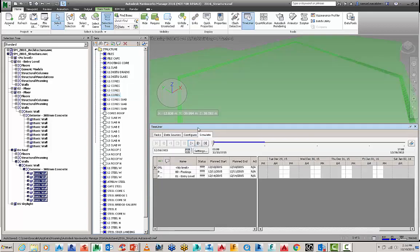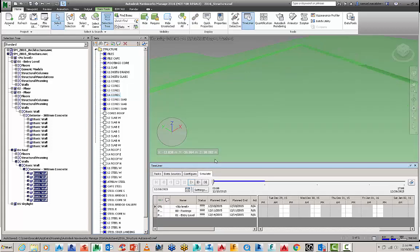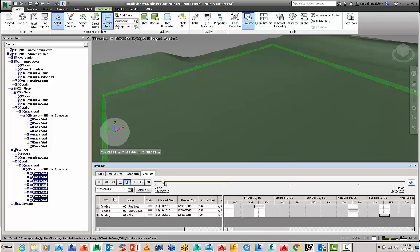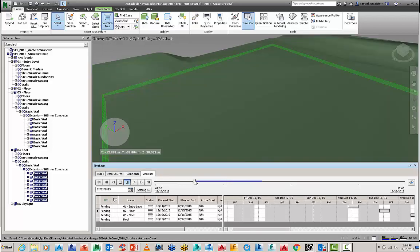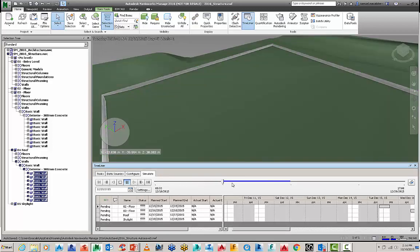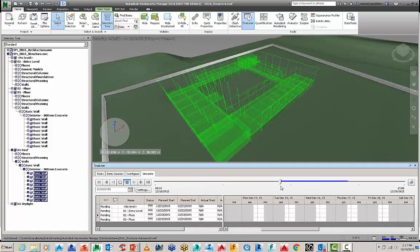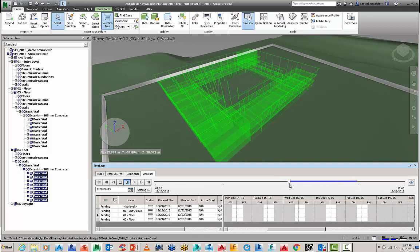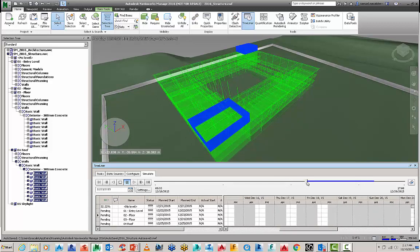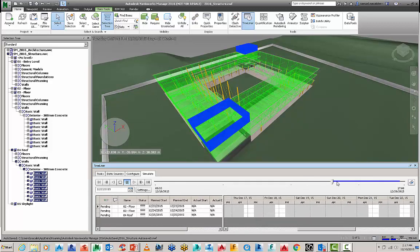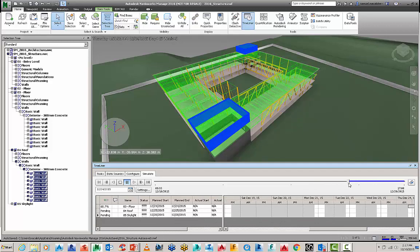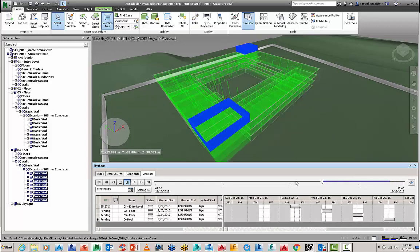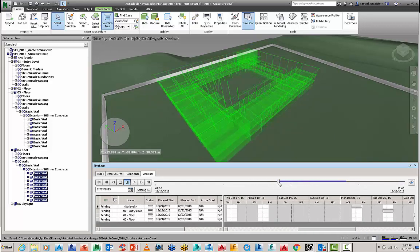And then finally we have simulate. So as soon as you go to the simulate tab everything's going to disappear and I've got a basic date and timestamp here and as I go and drag my slider here it's going to go through the build of the construction or displaying the model as per my construction timeline.